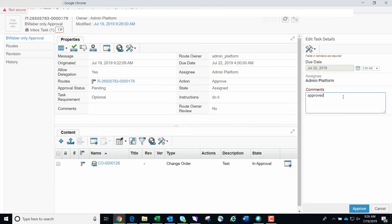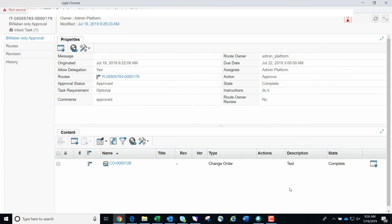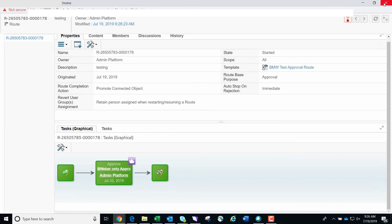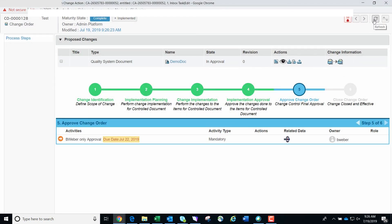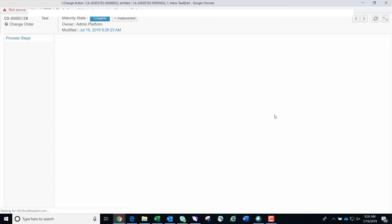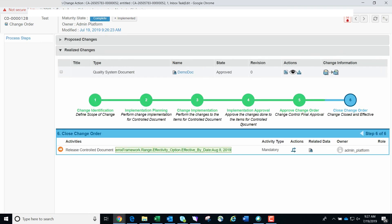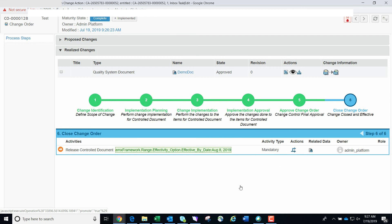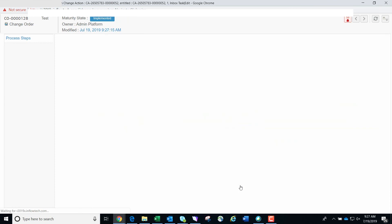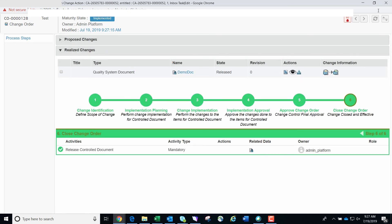The task has been finished. We close this window since we no longer need to do anything with this task, and also close the route screen since the route has finished. You're back on the CO process steps page — refresh the page to show the progress made by finishing the route approvals. The process steps page will now be on the sixth and final step, which will allow you to close the CO. Click the promote icon in the actions menu to release the CO. The CO has now finalized and you can close the window to be taken back to the process steps page of the original controlled document.